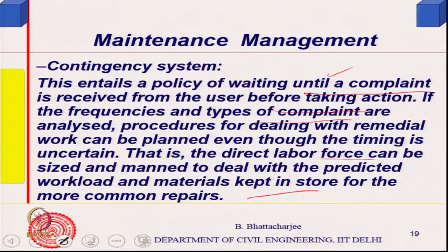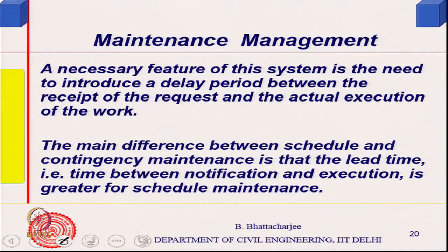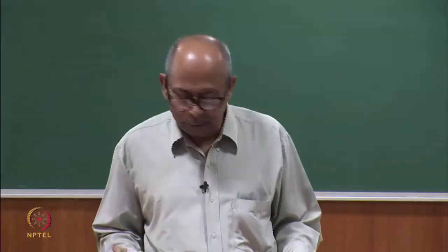So, preferably contingency works are done by direct labor force, and the overall workload you can predict, and also materials etc. you can keep in the store for the common repairs and such things. So, basically that is the difference between the contingency and schedule systems.